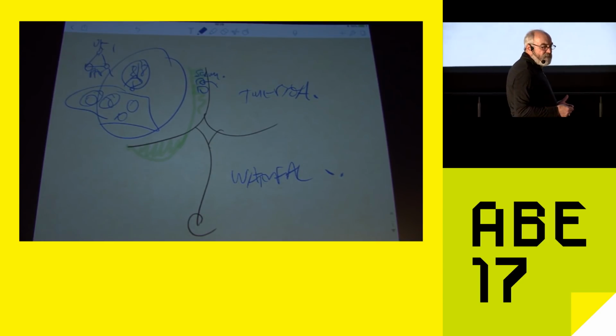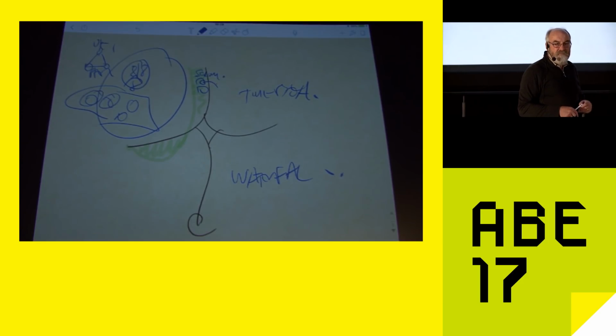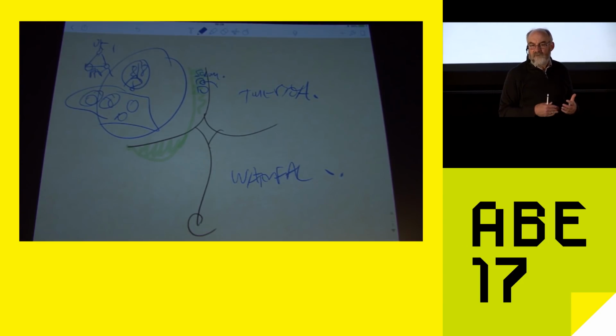What I'm basically trying to say is if we want Agile to survive, we've got to make it a flexible, fluid framework of multiple tools from multiple backgrounds. Kanban works very well in the complicated space, but it's poor for complex. On the other hand, the work in progress idea is a good one, but the way you represent work in progress in complex is not a series of cards in columns, but is a landscape map of potentiality.